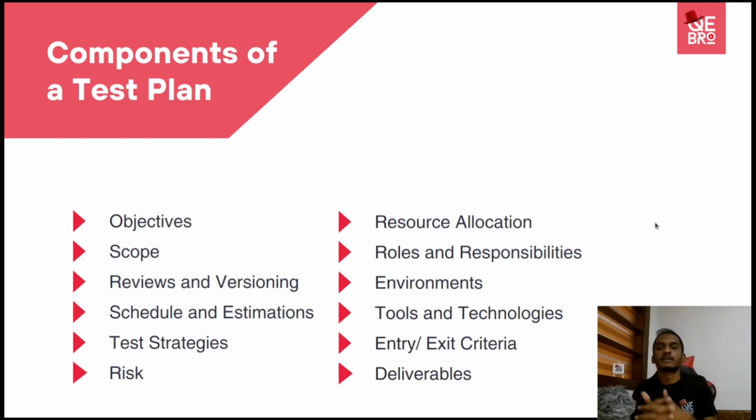Then again, we need to make note about deliverables as well at the test planning stage. So what are these deliverables? There can be different levels of deliverables as well: before testing, during testing, and after testing. Likewise, you can have multiple levels. So before testing, the deliverables are like the test plan. You need to finish the test plan and get the sign off. The test plan should be ready. Then maybe the environment should be ready. Test data creation is started, or test data is already prepared.